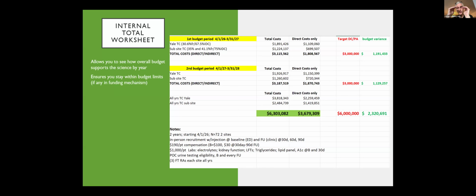They go through the budget justification line by line. You say you're spending $100,000 on this item and your justification is kind of poorly worded, and we question that. So we're thinking of cutting that out of your budget, after they've decided to fund the project. So yeah, you want to have a good explanation for where the money's going.